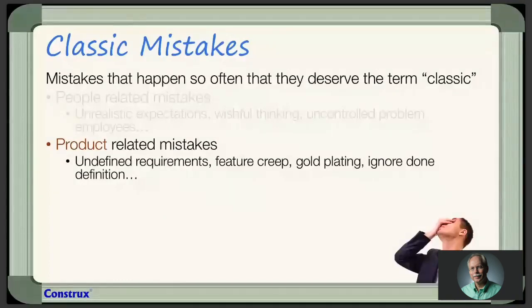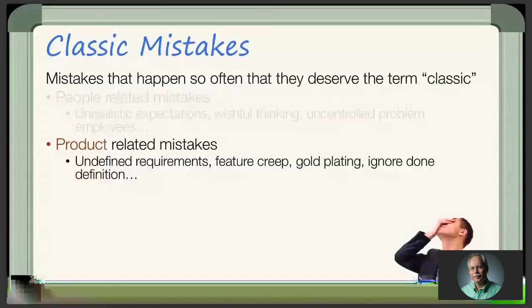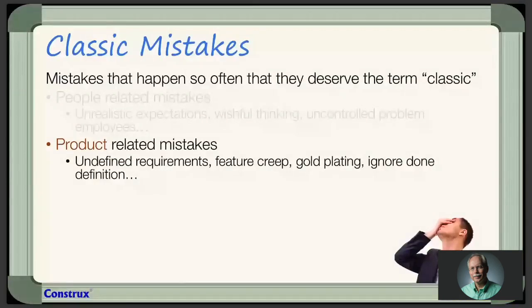And the 2 things here that stand out to me are really interesting. One is gold plating, because I see gold plating in 2 different ways. I see gold plating in terms of the stakeholders asking for more things than what they really need. Their minimum marketable feature set is loaded with things they really don't need to be minimal to get feedback. And there's also gold plating from the developer saying, I have to build all this infrastructure before I can release one useful thing to the customer. Otherwise, I can't do anything. And that's just not true either way. So we see gold plating on both sides.